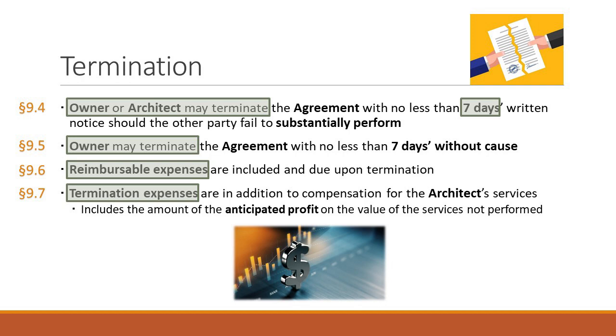So you start working, you start moving through, and 2/3 of the way through the project, the owner terminates you for convenience. You're like, all right, well, that sucks. I really like this project, but I'm not going to be working on it. But we can't get into litigation because they terminate for convenience. It doesn't matter whether they did something wrong or not. They're allowed to just walk away.